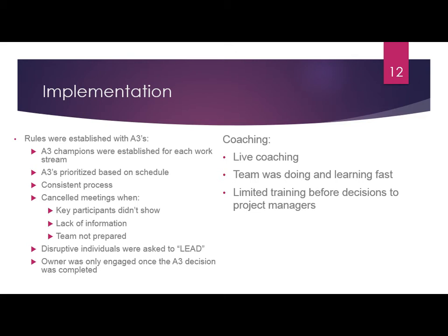So there were different leaders to deal with different parts of the building. And the A3s were also prioritized. So, okay, which decision needs to be done in which order and in accordance to the plan. And then we standardized the way in which they make decisions.